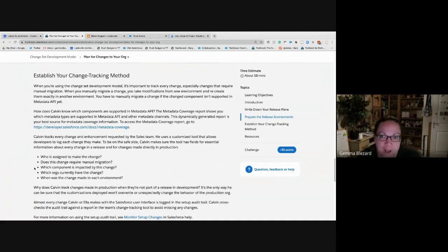It's not elegant. Whereas if you use the other approach where you're using Jira and you're integrating it with a Git repository, then you just check in your functionality into your branch, and then when everybody's happy with it, it gets merged into the main branch, and then the main branch is deployed into production. It just automates things and makes it a lot quicker. It's just a bit fiddly for those of us who don't code.